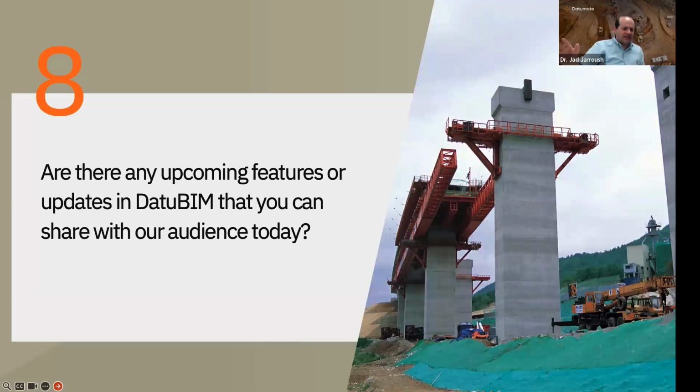Another example that I can also give is to calculate the volume of concrete or a specific material needed for the upcoming month. Usually, a site engineer is focusing on preparing the next week or the next month. How much concrete we need to buy in order to plan our cash flow or the budget of the project for the next month.